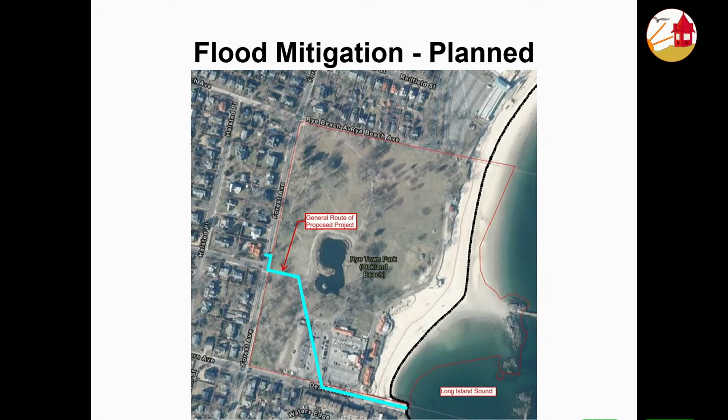And we are also in the process of getting approved by the Westchester Stormwater Mitigation Program, and for that we have to get into what is known as the reconnaissance plan, which requires approval by the Stormwater Advisory Board. We're in the process of going through all of that, and with any luck we will be able to pursue that application within the next month or so.